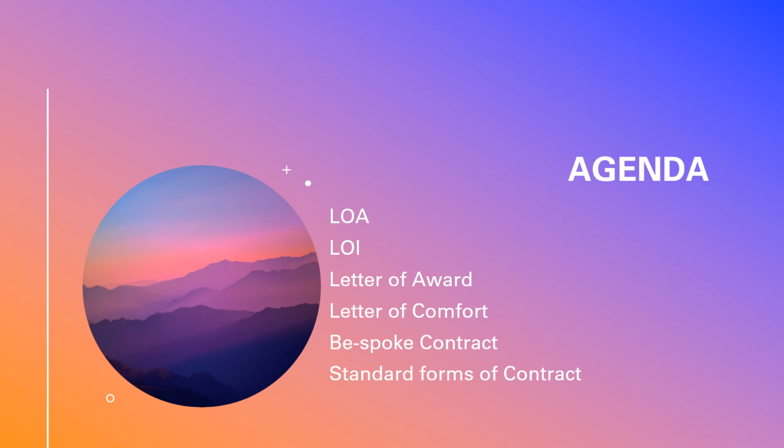Okay, now what is a bespoke form of contract? Guys, the form of contract is mainly of two types, I can tell you: standard form of contract and bespoke form of contract. So a standard form of contract is something which is based on FIDIC, NEC, JCT, because it's already prepared, it's already time tested, it's ready to use actually.